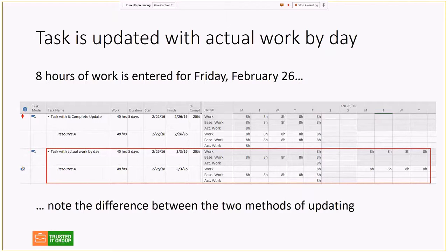Much like we talked about in the project maturity scorecard report, we've got remaining work scheduled in the past. When people use the timesheet, this is what you're going to see, that the resource is really not available Monday through Thursday of next week, only available on Friday of next week. So how you update your assignments has a lot to do with data accuracy.